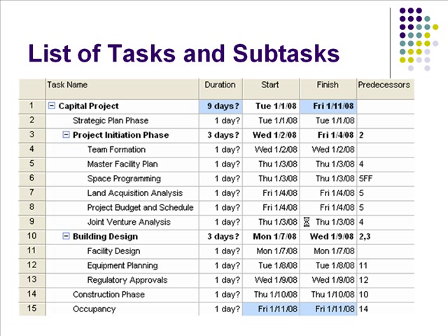This slide shows a list of tasks and subtasks involved in the project. It also shows that this project is set to begin on January 1st, 2008. As you can see, there is a predecessors column. The column shows which tasks must be completed before that particular task can begin.